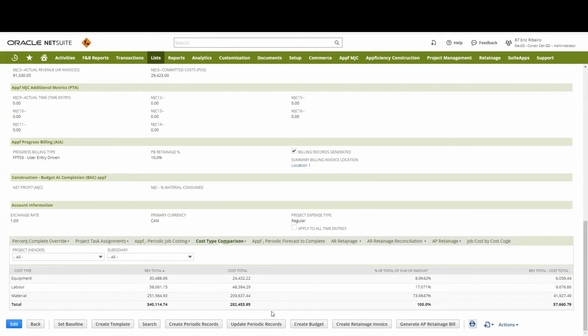And so labor in NetSuite, for example, that's populated by way of payroll journal entries or time cards. Material, that can be entered by way of AP entry, vendor invoice. And for those that do inventory, doing inventory transfers to expense to the job. So these estimated cost values are all pulling from the estimate and or job setup, right? But at the end of the day,